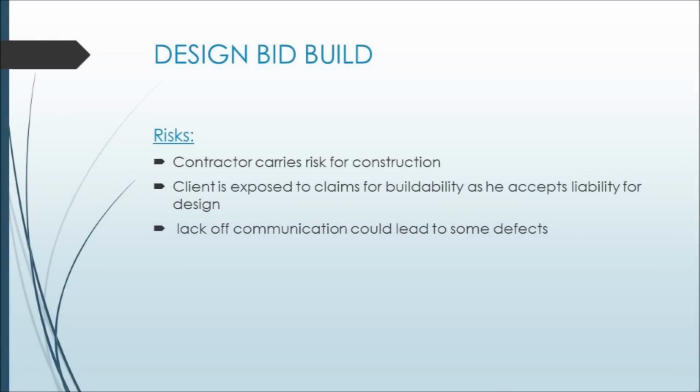You will accept liability for the design once you accept it from the designer. And lack of communication could lead to defects and variations during the construction. Also, with competitive tendering, this could lead to adverse relationships between contractors.